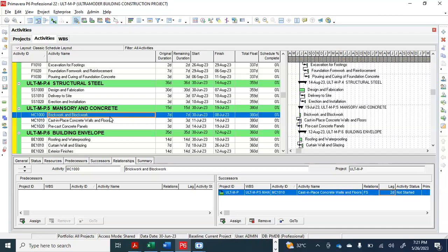I've shown us how to implement this lag time. It is only used for our site activity to be realistic. It doesn't apply to the client contract. It is we who know we have to dry this thing for 2 days.